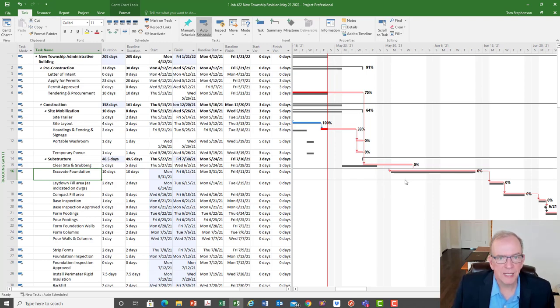That is the C in the direct method. Detect along the critical path, look for the immediate solution, look to reduce the cost, DIR, experiment, and then communicate. Get the commitment of the people involved, and this is going to help the team. So that's DIRECT, direct method. So hopefully that's giving you an indication of how you can look at resolving and getting the